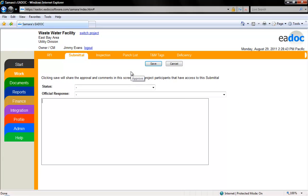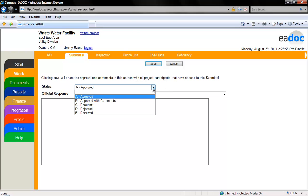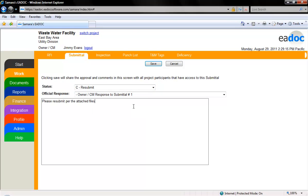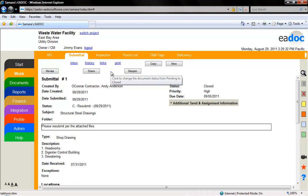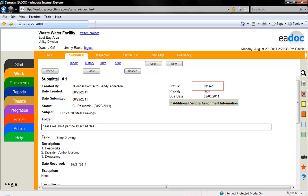This will take you to a screen where you can select the status and the official response. You can add any additional information in the comment box. Once you click the save button, the status and official response will be shared with all of the users who have access to the original submittal. Notice how your final comments appear at the top of the submittal under the subject line. Once a status has been assigned, click the close button. It will be archived in the closed folder in the browse box. Closing the submittal will allow users to revise it if necessary.